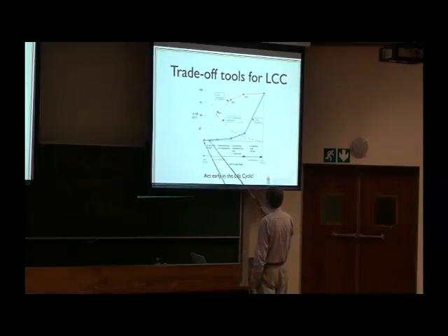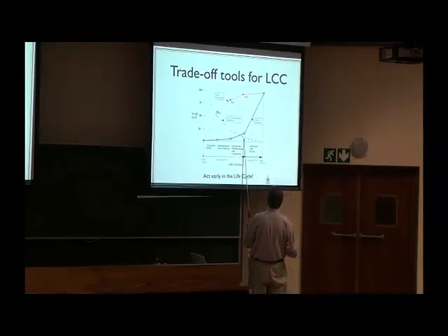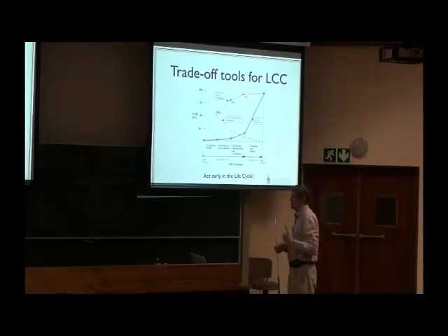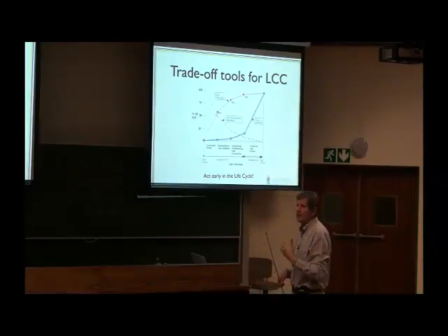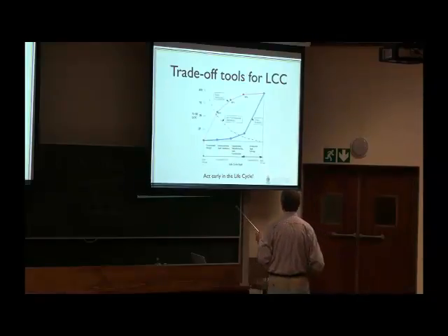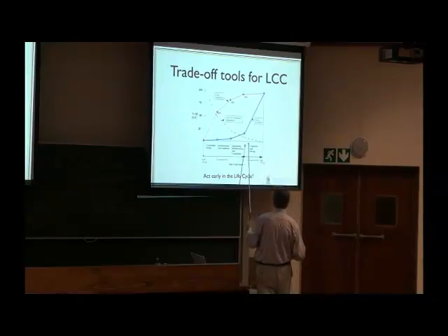Now normally you would talk of conceptual design and preliminary design and detailed design and development. Doesn't matter what the names are, but the figures are fairly consistent to say that 95% of your decisions have been made before you get the piece of equipment. 95% of your life cycle cost is fixed. So you only have a chance to play around with the other 5%. That's all you can do in practice. So that's why it's so important to make sure that you get the right thing up here.